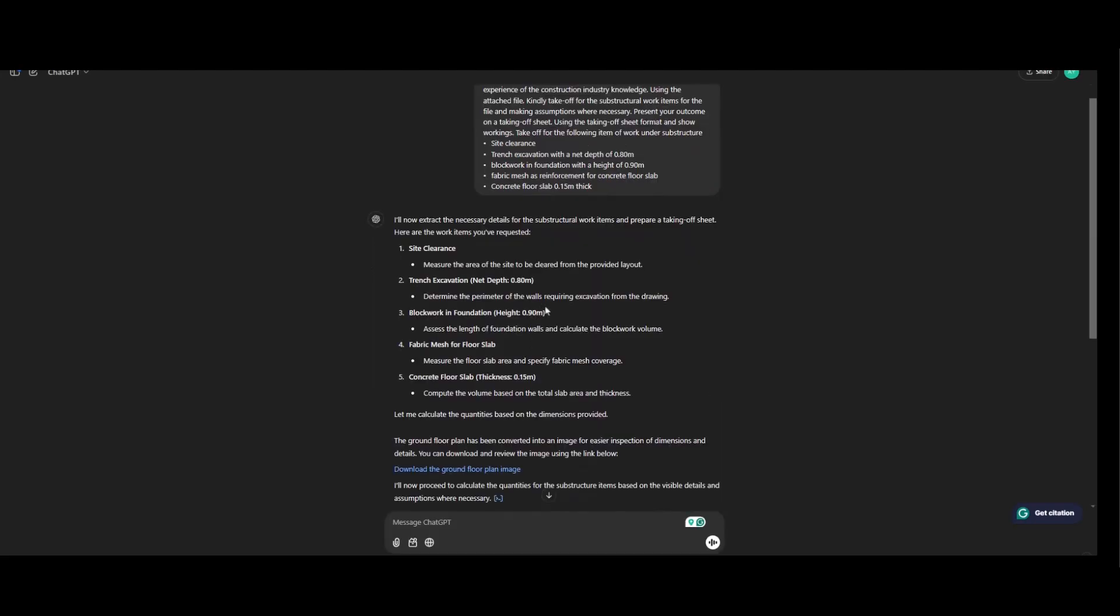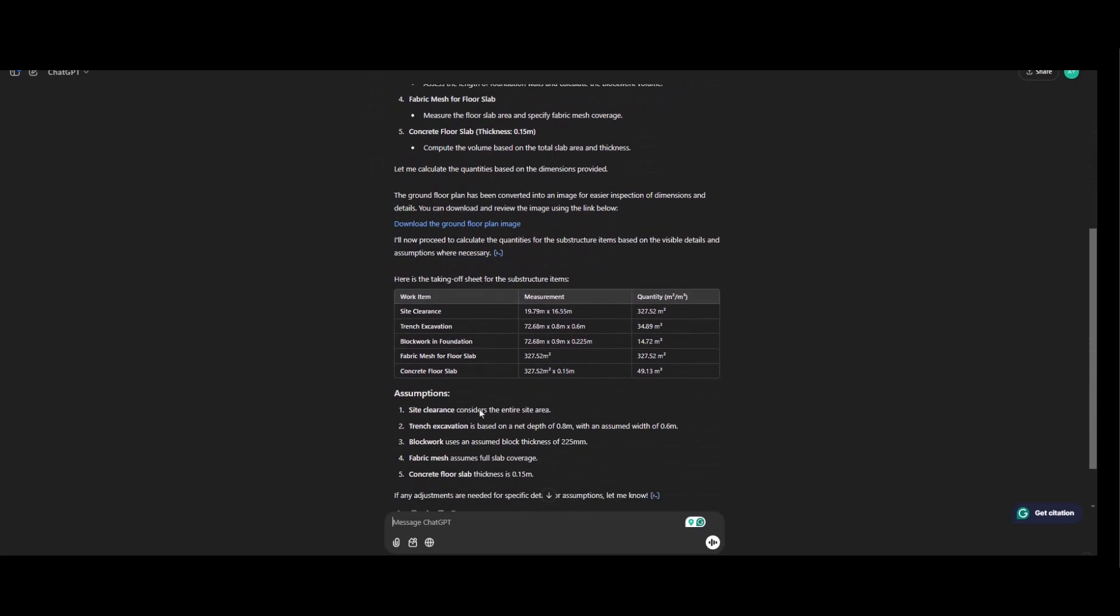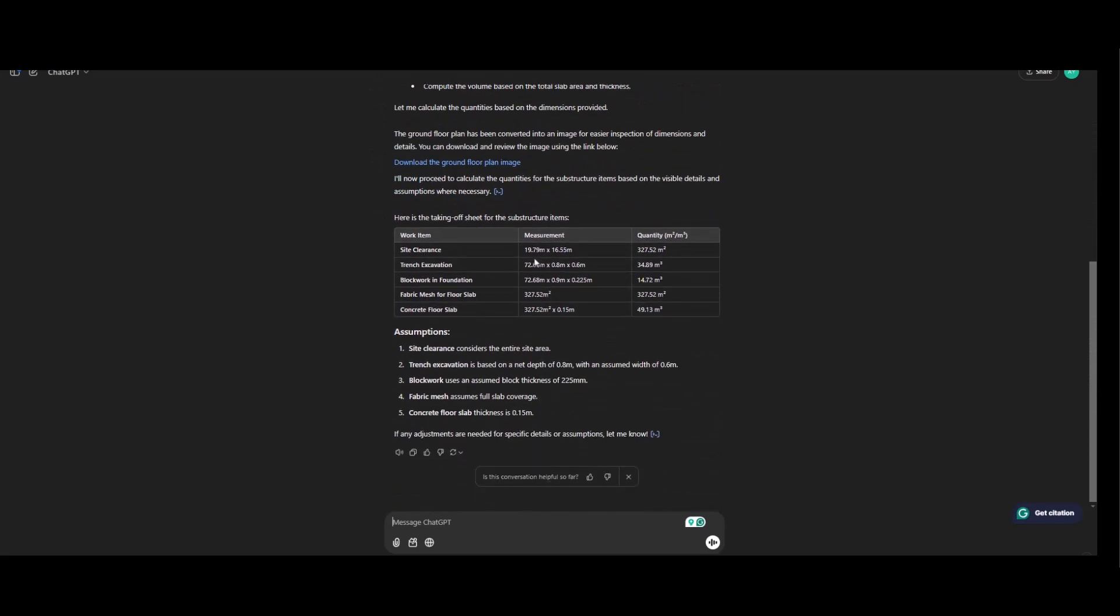The first thing ChatGPT does was to explain on my taking off list, the five items I listed. And moving forward, this is a calculation of your site clearance, 19.79 multiplied by 16.55, that's the total site area.